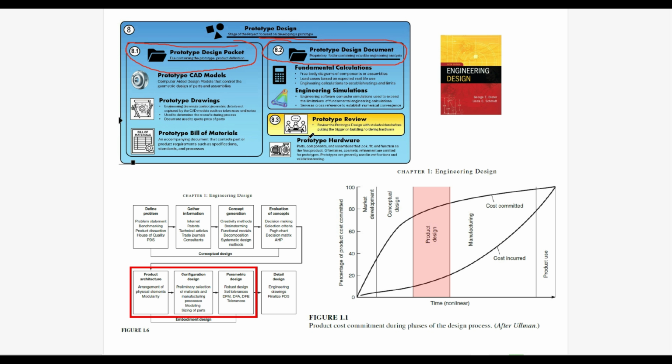And then before we actually send the quote to spend money on the prototype hardware, what we want to do is have a prototype review. So sit together with the clients and see if that's what the client was expecting, if that's the prototype they want to move forward with, get approval, and then pull the trigger. And of course, the whole point of card number 8 is to have prototype hardware in hand, and that will ultimately be used for testing. So we want to get the approval and have a discussion with them before we move to the next step.